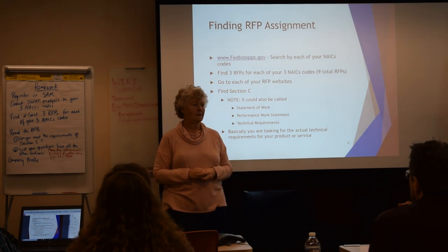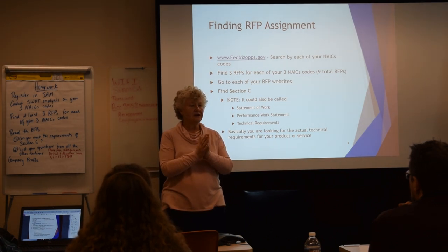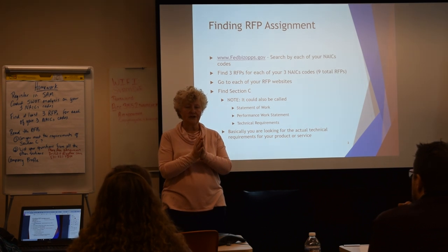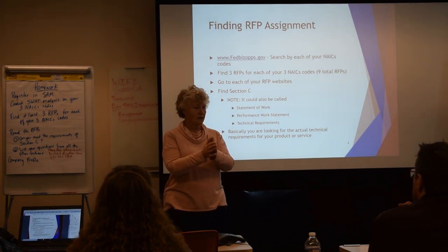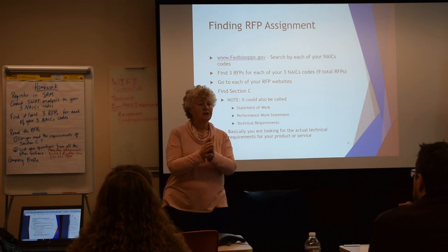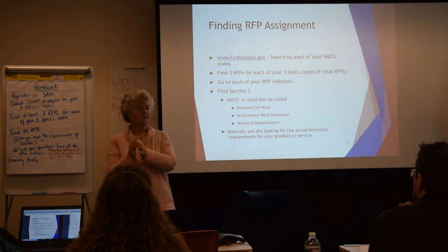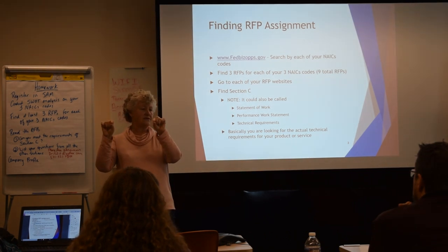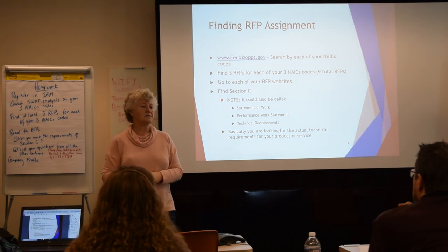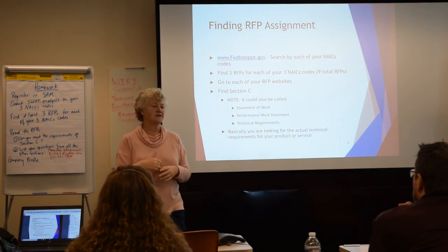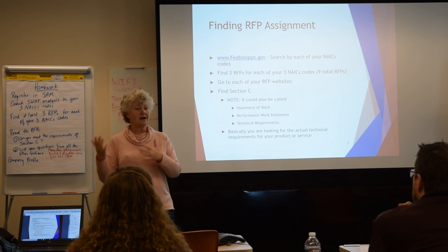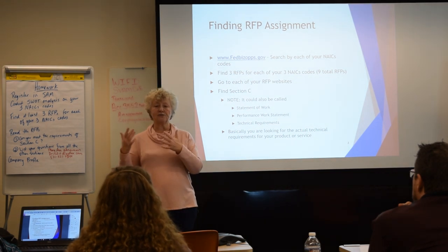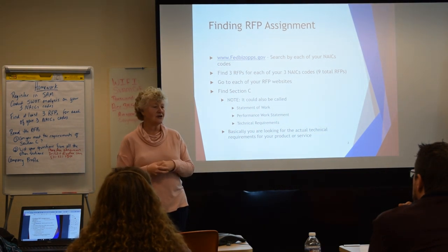Everybody with me? So the government right now is in a transition between statements of work, thou shalt, to performance work statements where they just tell you what the standard is that you have to meet, and you figure out the solution to that. And what they've done by doing that is they've switched the risk, because who's drafting the contract now?